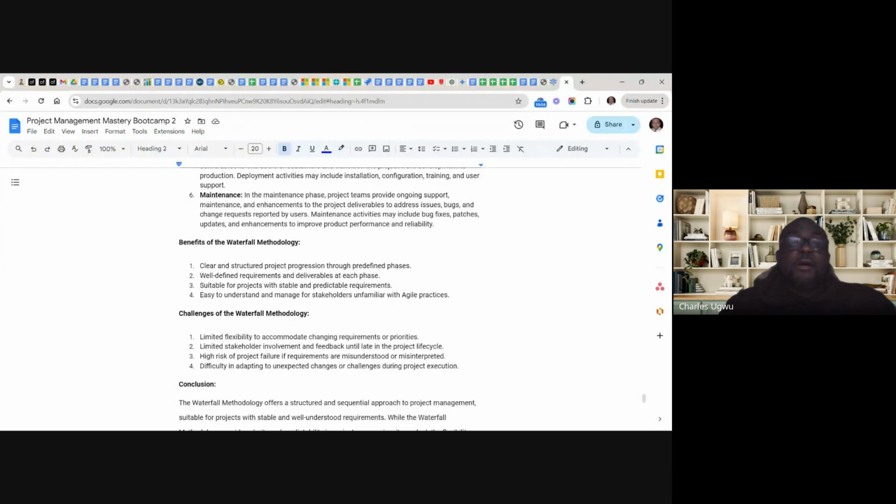That is about predictable requirements. The reason why waterfall is very popular in the construction industry is because in the construction industry, most of their requirements are very much predictable. And that's why they use it very well.